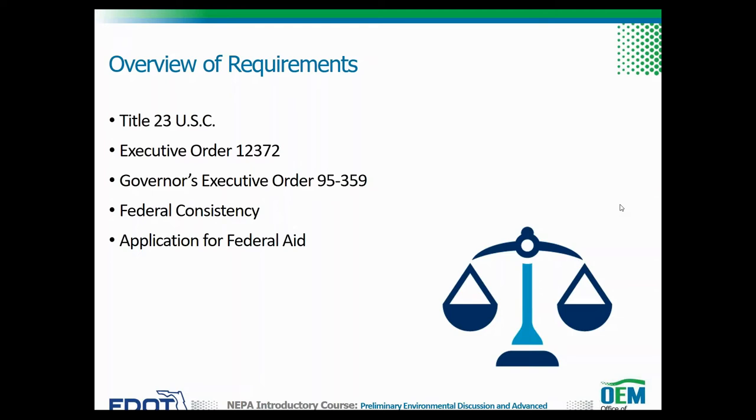The AN also provides notice of FDOT's intent to apply for federal aid on a project by including the application for federal aid in the AN package.